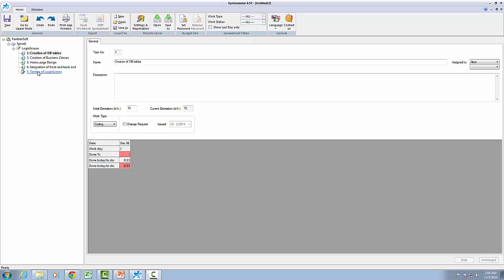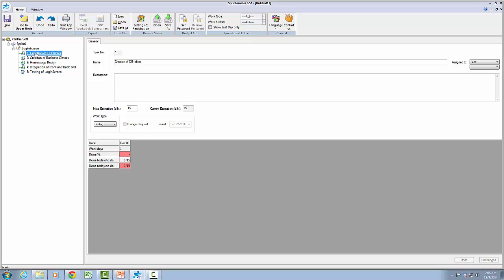Now let us assume that we have completed day 1 of the sprint. At the end of the day, the team member should enter the efforts in the tool so that the progress of the sprint can be tracked. For the first task, Alice comes and updates that 3 ideal hours of work have been completed. Similarly, the rest of the team members update the efforts respectively.